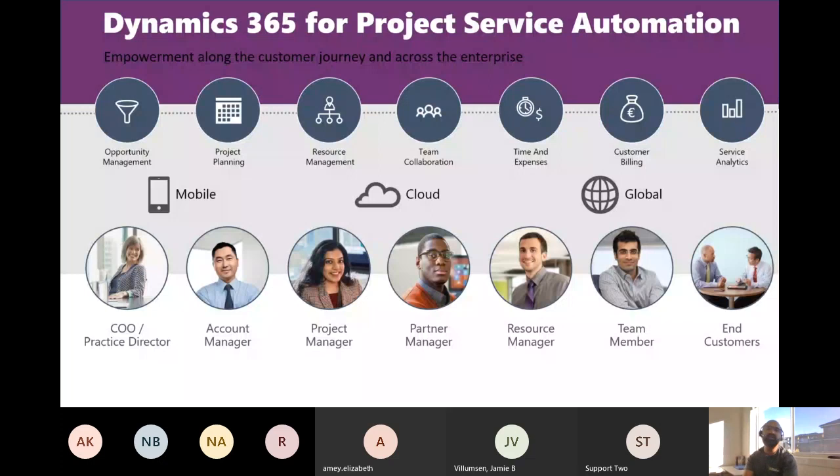It has been going on for at least the last 10-15 years. How do you do project management? First thing, you have to understand what the requirements are. You divide your requirements into items that are easily trackable, that you can identify into small pieces. For example, if you're constructing a house, we will put the foundation, then we will put the frame, then we will put the interior, then we will do the other fixtures. You divide the things like that.